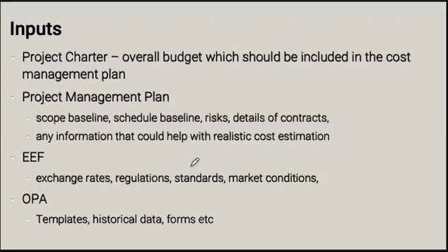We're also going to have a couple of important enterprise environmental factors, and they are actually very critical in this case, especially if the project is being carried out by a multinational company. Where I worked, the company where I worked, all the costing was carried out in dollars, even though the company was operating in a eurozone. So you can see how the exchange rate could have significant impact on the resulting project costs.